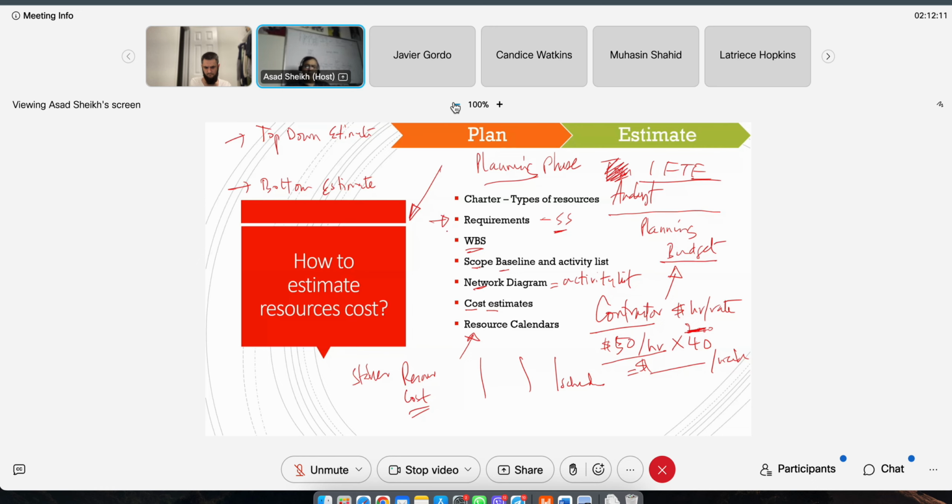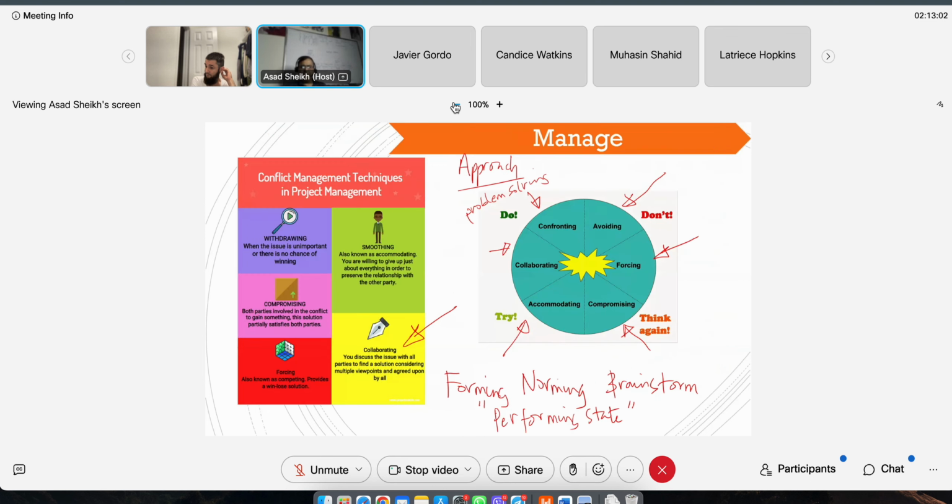All right, and when it comes to coming up with a schedule, we'll go through it in a similar fashion. We're going to go through the requirements, the WBS, scope, cost, and then time. The cost is the time he's going to take to complete these tasks. But right now there are other things that we are not considering here, but we will when we come up with the schedule eventually. But again, at this point in time, all you need to know is that resource cost has to be estimated at either a top-down level, which is when you first started off, or a bottom-up where it's more detail. An hourly rate sort of gives you somewhere in between. With an hourly rate, you multiply by the amount of time, you get your total number of hours, and you can estimate your cost. So that's pretty much it.